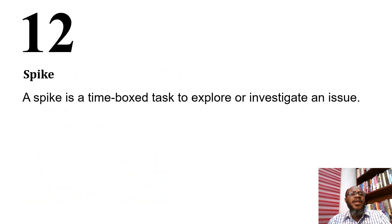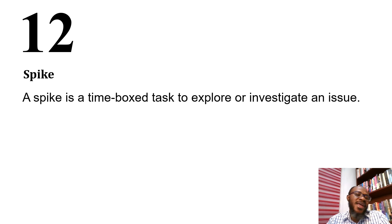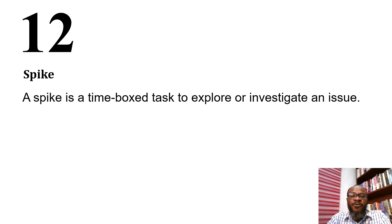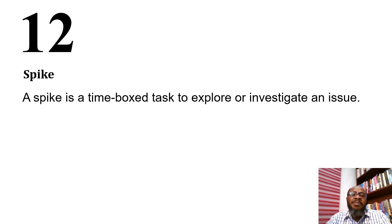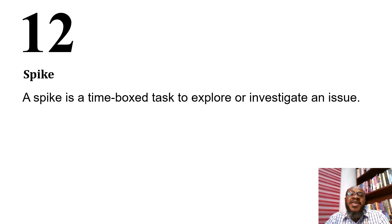A spike is a time-boxed task to explore or investigate an issue. Normally, a story card leads to a feature being created, but sometimes there is an issue or we need to estimate how long a user story will take and we don't have enough information. In that case we create a spike. A spike uses time but does not produce a feature — it exists to explore, research, or investigate, for example to create an estimate for an existing user story.